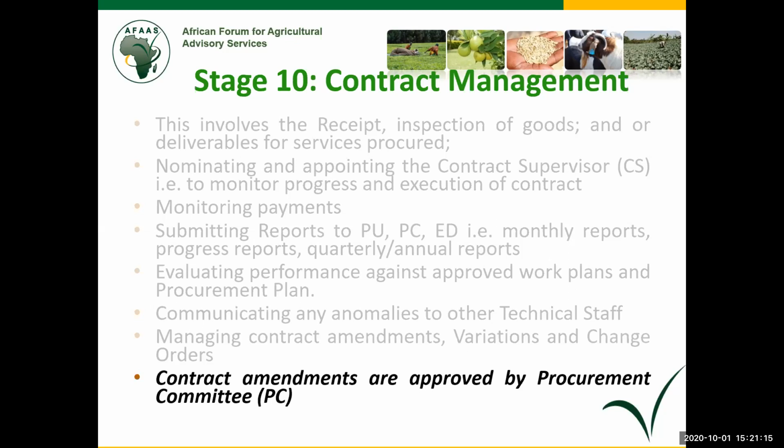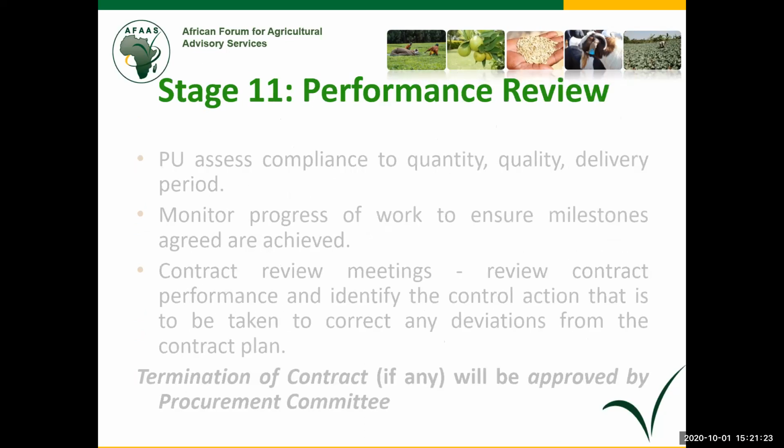But remember that all contract amendments must be approved by the Procurement Awards Committee. Performance review, which is the last stage. The procurement unit assesses compliance to the quantity, quality, and delivery periods that were given to the supplier. We do the monitoring of progress of work to ensure the milestones agreed are